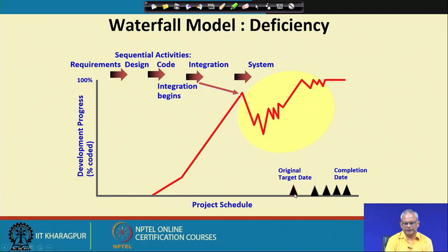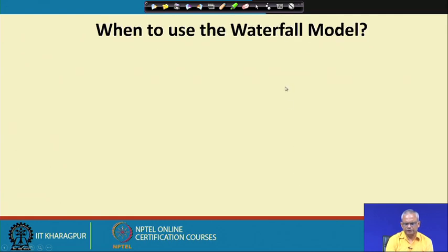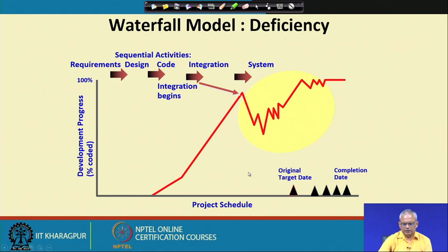This was the time by which the system testing should be over, but unfortunately the integration problems occur here, because till now it was under the grasp of one developer who has done the unit testing, but then the different developers have made different assumptions and they do not integrate well.